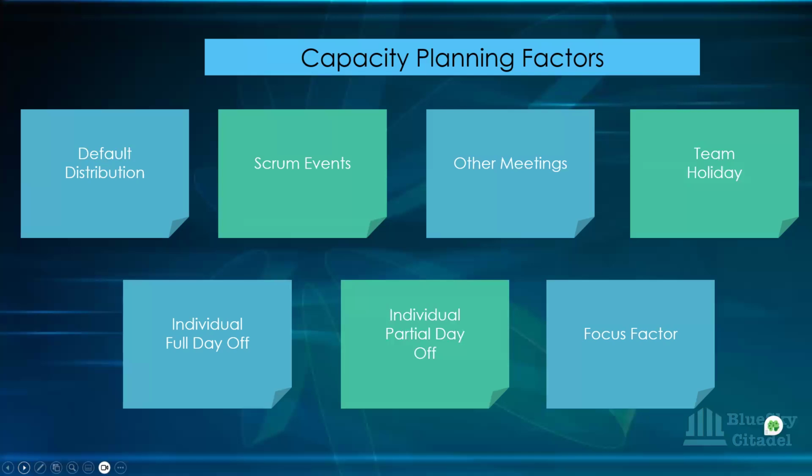So you're looking at the Scrum events. Your Scrum events involve meetings like your sprint planning, your daily stand up, your review meeting, and your retrospective meetings. Those hours that you use to do all those meetings, you are not actively coding or testing as an engineer. So all those hours are also some of the factors that affect your capacity planning.